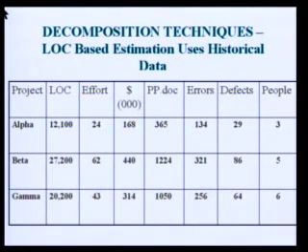So here 12,100 for alpha project, then for beta project it is something around 27, then for gamma project it is 20 KLOC. For 20 KLOC you are having 64 defects, so it is nothing but 64 by 20 KLOC. So in that way you need to calculate the number of defects per KLOC. This is how you will be making a standard list of estimates.